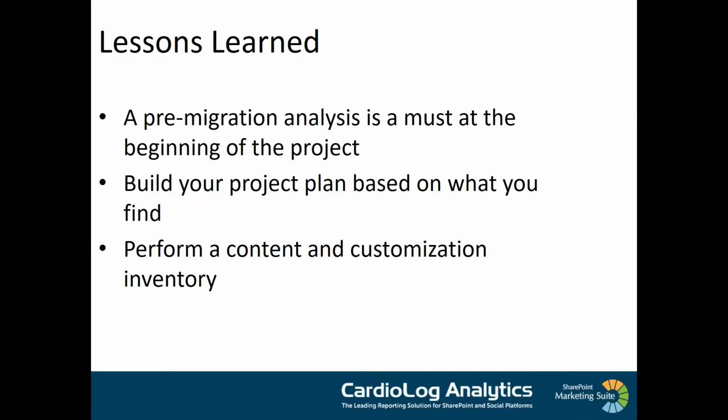You need to have a pre-migration analysis at the beginning of the project, so you will actually know more about what you should transfer. You need to build your project plan based on what you find in that pre-migration analysis phase. And of course, you need to create a content and customization inventory. You need to know where your content is stored, how much you have stored in which site and which library. And you need to know what kind of customization has been done to your environment to be able to replicate it and change it in your target environment.